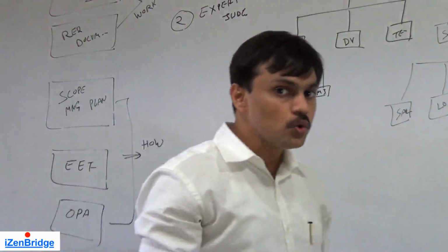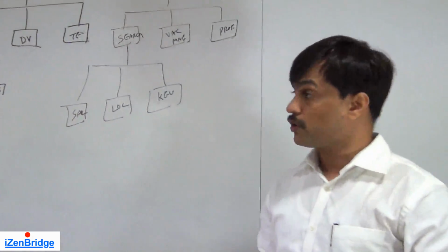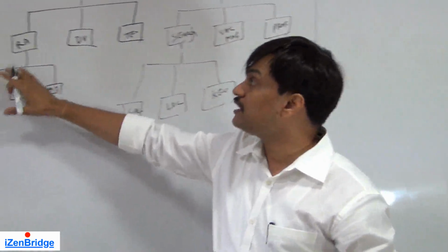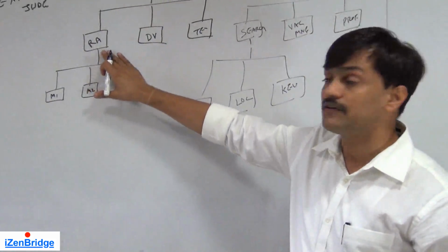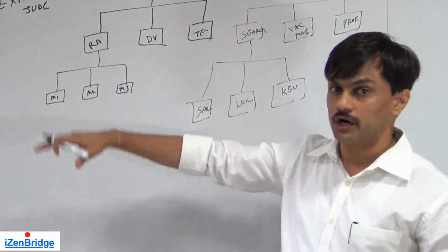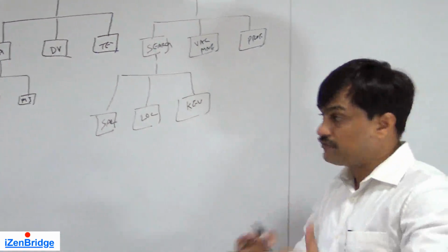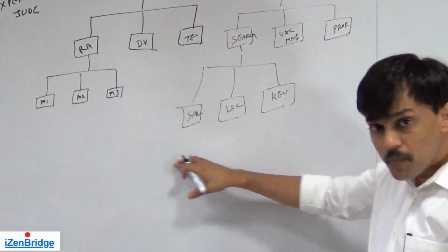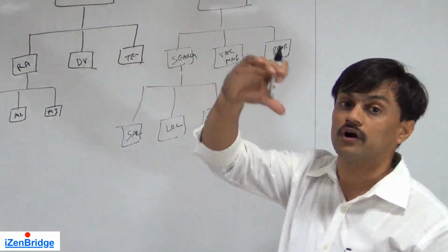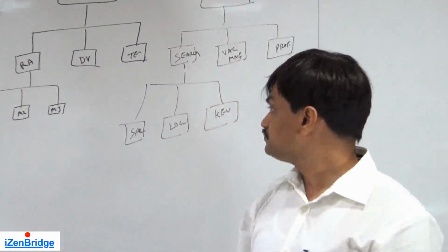It is good to have a deliverable-oriented work breakdown structure, because by completing some component, or even in a phase-wise approach, the phase-level deliverable should come here, and these deliverables should be mentioned in your project scope statement. So you know that this particular deliverable has these many sub-components, and once I am done with these sub-components, I can go for verification or acceptance of that particular deliverable.